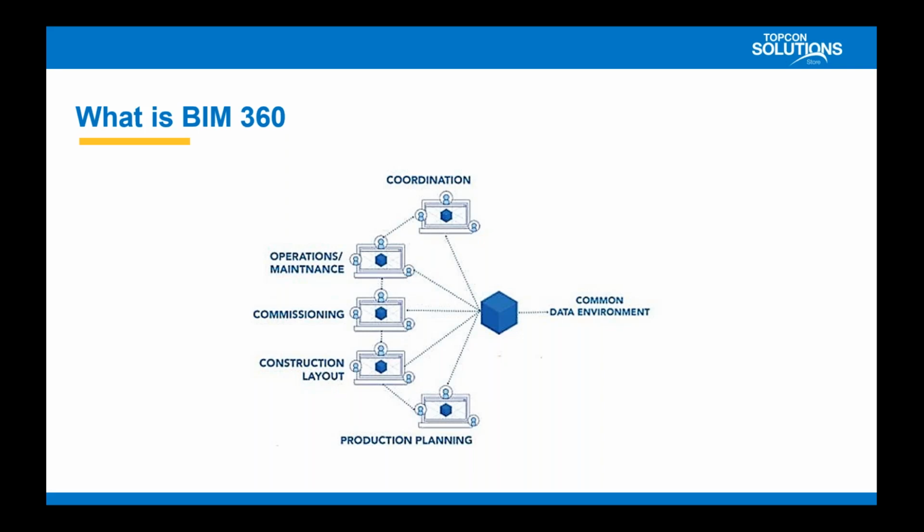And we realize that it's not going to fit everybody's existing systems perfectly, but what it does provide is an underpinning called Forge, which is just a series of APIs that allows us to talk to pretty much any platform, any device or any technology you're using. We can figure out a way to communicate using the Forge APIs to push and pull data, and do some remarkable things, like JE Dunn has done, where they've connected their estimation database to their models, and every time a model updates, it ties back to their estimation database.